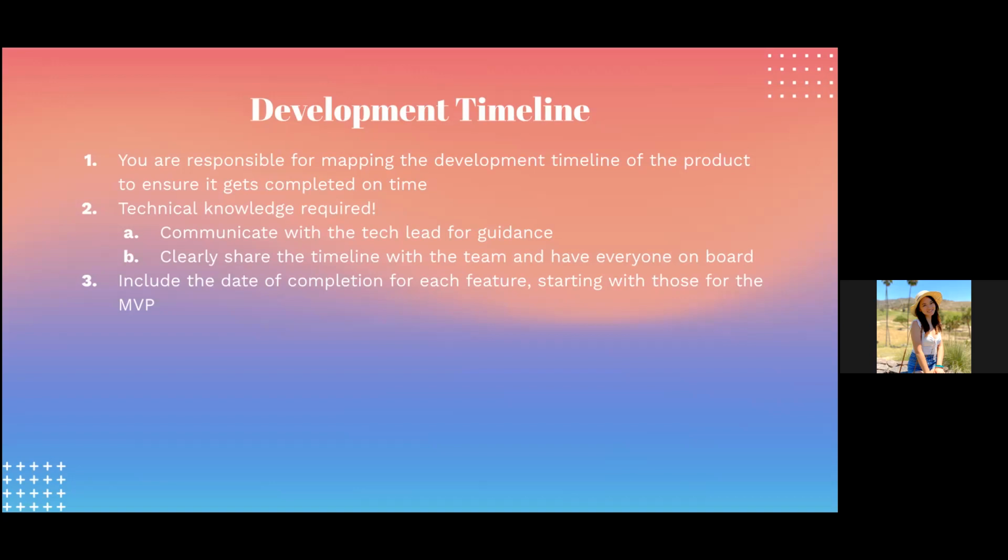For making the product timeline, some technical knowledge is required. The goal right now, it's okay if you're not exactly sure how long it takes to make a login screen. That varies by team and by user. You can make a rough timeline and approximate these steps. After you meet with your nonprofit, you'll be paired with a tech lead who can give you more accurate guidance on exactly how long things will take. This should be clearly communicated, and you can update it throughout the process. It's really important that the team knows the timeline too, so everyone stays on track.